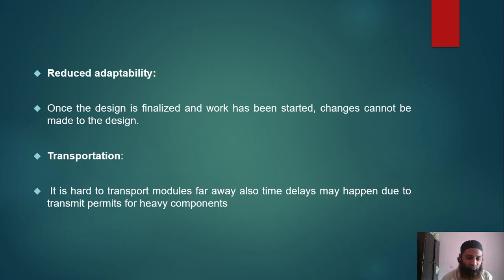Transportation: it is hard to transport modules far away. Also, time delays may happen due to transit permits for heavy components, because there are very huge components. Sometimes during transportation, handling, and then assembling there, there are chances of mismatch also, and the heavy components might take time to come from off-site to on-site, and there it will sometimes be very difficult to cast as per the requirement. Sometimes this happens.